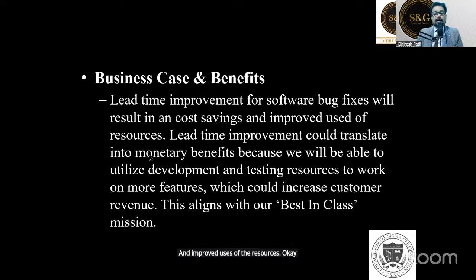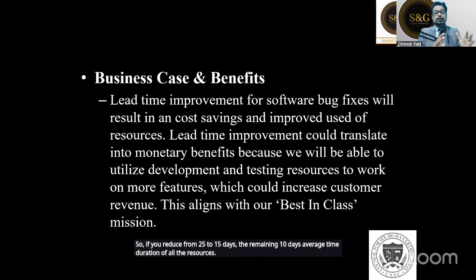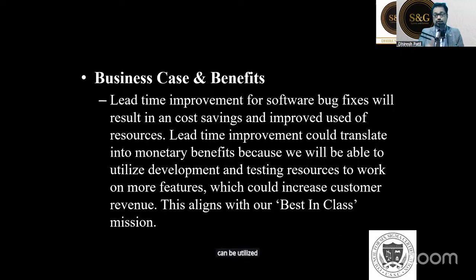Let's say 25 days is the average to fix one bug. If you reduce it from 25 to 15 days, the remaining 10 days of average time of all the resources can be utilized, which saves a lot of cost and improves resource utilization.